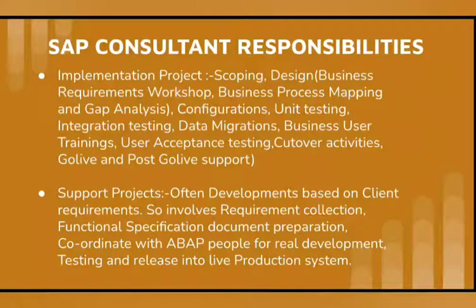Here I classified this into generic phases: scoping, design and configurations, unit testing, integration testing, data migrations, business user trainings, user acceptance testing, cutover activities, go live and post go live support.